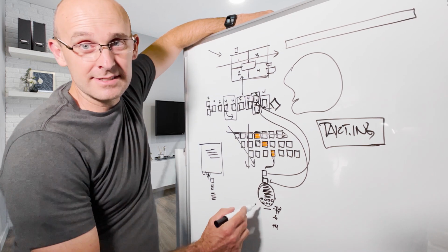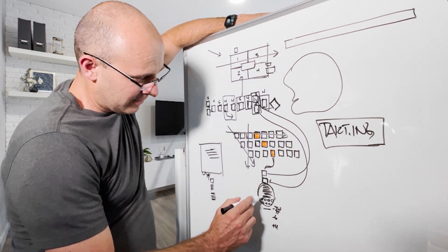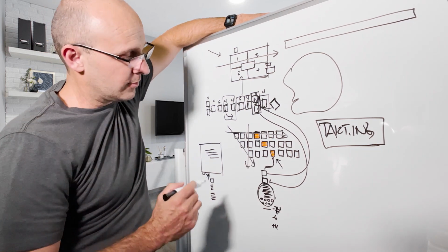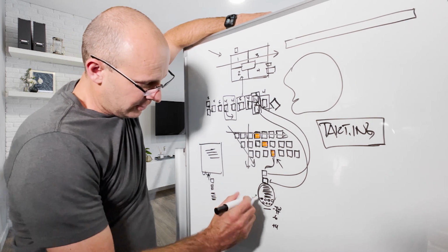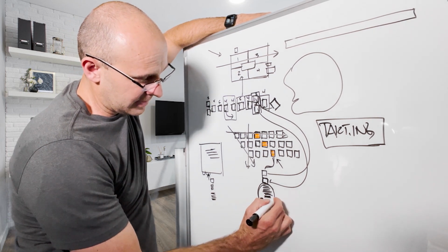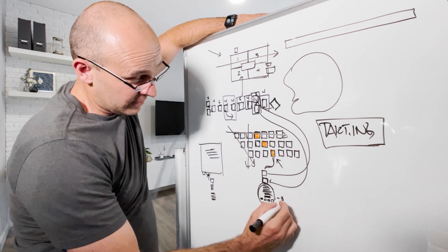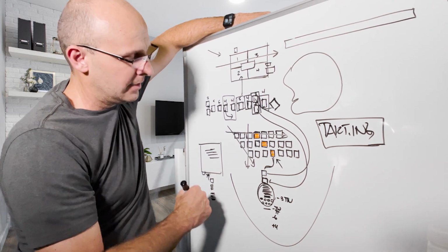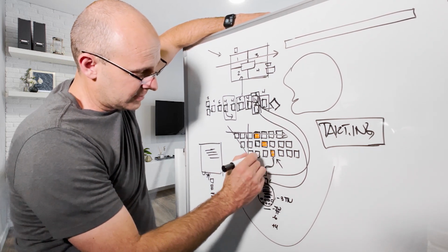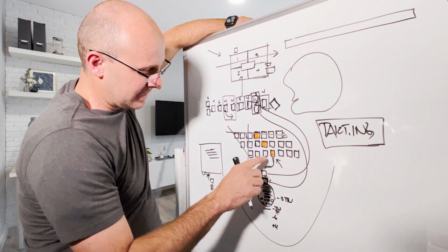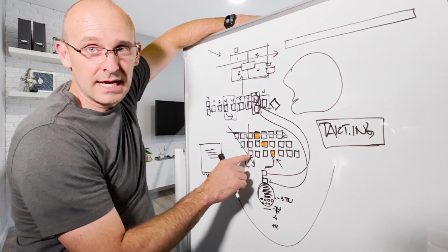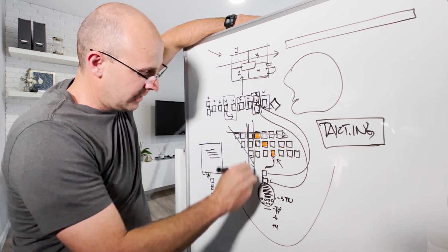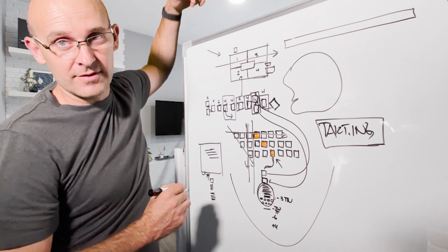What it will do, and I'm gonna blow your mind, if you had one in here that said, okay, for this activity right here, you needed a plan or a pre-construction meeting or something, you could write in the work steps pre-construction meeting and -3, whether it's for the Takt time or the Takt wagons, however you format it, whether it's in takting or the Excel template, and it will automatically put the work step of planning this one back into this Takt wagon here in the work steps, so that when you hit this week, it's included in there that you need to get ready for that one over there.